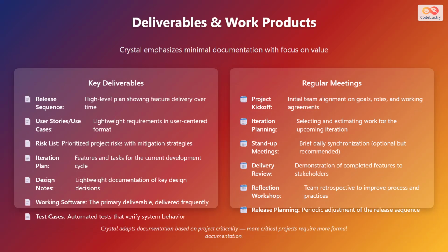Crystal emphasizes minimal documentation, focusing on value-driven deliverables and efficient meetings. Key deliverables include a release sequence, which is a high-level plan showing feature delivery over time. User stories or use cases provide lightweight requirements in a user-centered format. A risk list prioritizes project risks with mitigation strategies. An iteration plan outlines features and tasks for the current development cycle.